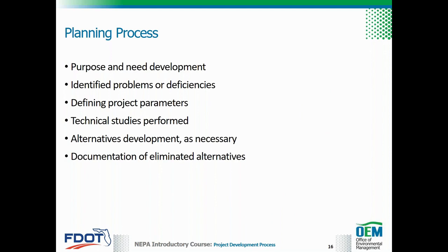Technical studies for a project can be performed within the planning phase to define or refine project parameters and establish the purpose and need for the project. They may also determine funding needs, identify alternatives, including alternative modes, and define the concept and scope for the transportation improvements, including general location and the proposed project. The planning studies inform the development of the scope of work for PD&E studies.